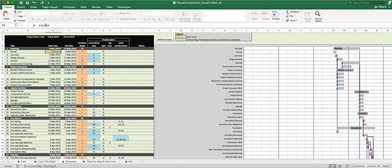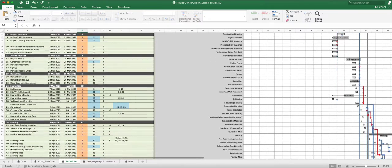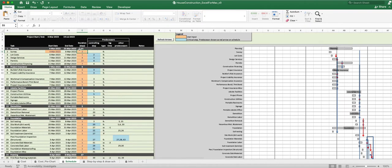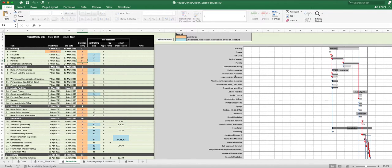This is your start date — so we're going to say March 4th, 2023. You can see that the chart is going to update based on that. Let's say your design services duration changes to 10 — watch what happens on this side of the Gantt chart. I'll hit enter now. You can see it updated. After you finish updating, you come over here and click the refresh arrows button, and it'll put the arrows back on the blocks where they belong.